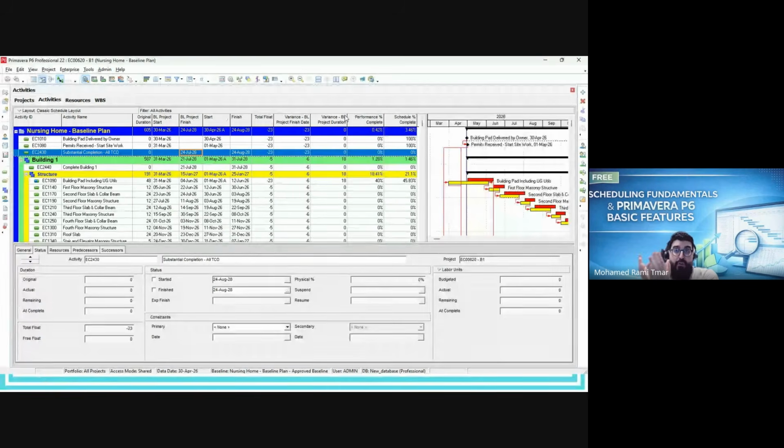So the conclusion: you have a positive progress since you earned progress from non-critical activity, and in parallel you have a good CPI and SPI, because it's a simple comparison between budgeted, earned and planned. But from a schedule perspective, your critical path is delayed because you are not making good progress on the right path, the most critical path. This is the importance of multiple path analysis. I don't know if it's clear, but I ask you to go and check the article. I really detailed this with detailed examples.